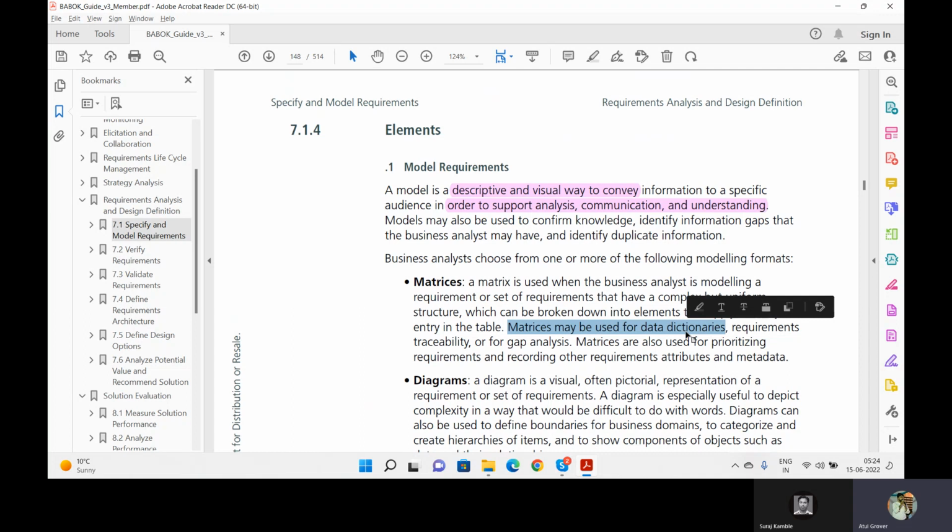There's a concept called the traceability matrix, the requirement traceability matrix. What we do in that requirement traceability matrix is divide the requirements in such a manner and add them into an Excel sheet, so everything should be very clear. So at the end, it should not create a problem for me that I have missed something here.